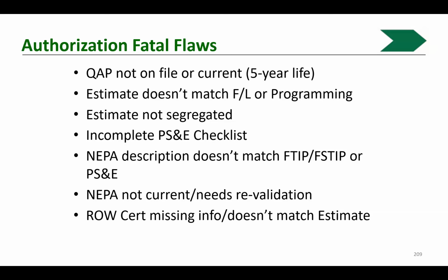Yeah, Susie, thank you. So the QAP form is your quality assurance plan for your agency. It's formatted by you. It's a document that each local agency creates to determine how they're going to assure the quality for their lab tests, et cetera. But if you're submitting a new one or a revised one, it does need to go to the DLAE. They submit it to headquarters to be reviewed by our TransLab folks to verify that it's updated.